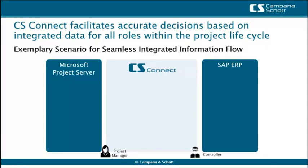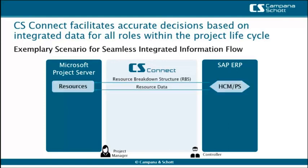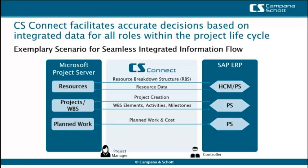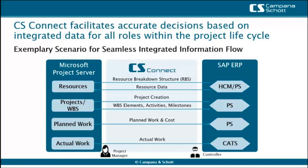The following scenario contains exemplary integration needs when integrating Microsoft Project Server with SAP ERP. To manage the resource pool in Microsoft Project, the resource breakdown structure and the resource master data is transferred from SAP. Project master data and work breakdown structures can be created in Microsoft Project or SAP and be transferred in both directions. During the course of the project, more detailed information like planned and actual work can be transferred to SAP.